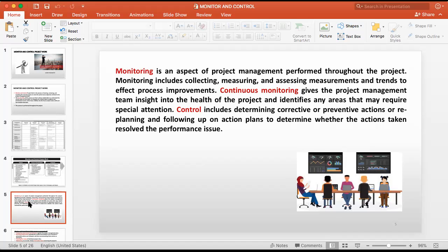So you have to have a very good project management team to do that. The project manager's function is to overlook all these things, carry out meetings with your staff, and give your judgment. And likewise, you have to do continuous monitoring. Normally in big projects, every day there's a progress meeting. Sometimes soon after the project work is over, sometimes at 5 p.m., sometimes it will go up to 7 p.m. Some projects have weekly meetings, some have fortnightly meetings.